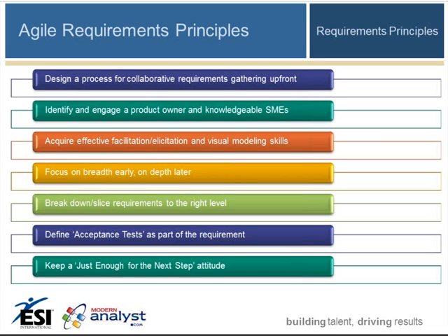In terms of the requirements, another key element is understanding that you are going to focus on the breadth of the project's requirements early and then focus on depth later. So from a business analyst and requirements gathering perspective, we're going to try to understand the entirety of the requirements initially, and then at the appropriate time in the iterative approach, we're going to drill down to the level of detail that's needed. That leads us to the next principle, which is that we will break down and slice requirements to the right level. This is something of an apportioning exercise, which we'll examine in a little more detail later in the presentation.